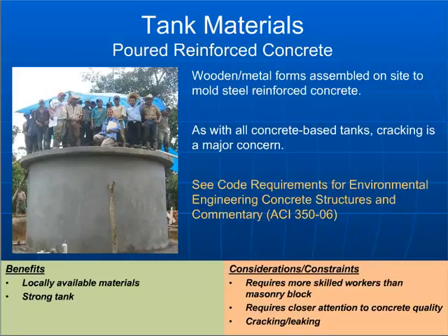The major concerns can be related to cracking, leaking of the tank, making sure that the quality of the concrete that's mixed and poured for the tank walls is appropriate for a structural mix as opposed to just a slab mix or sidewalk mix or something like that.